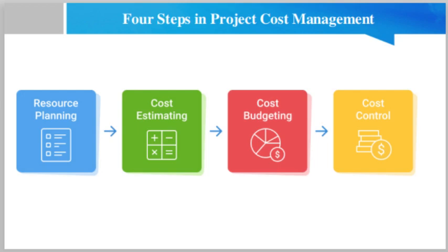Since failure to foresee environmental changes increases the risk of cost overrun, you may consider carrying out a risk based cost analysis as well. For example, evaluate potential loss due to a delay in the supply of essential production materials, some technical issues, or even a discharge of a very important employee. Choose anything that makes sense in your situation and add the predefined cost of the event to other estimation results.